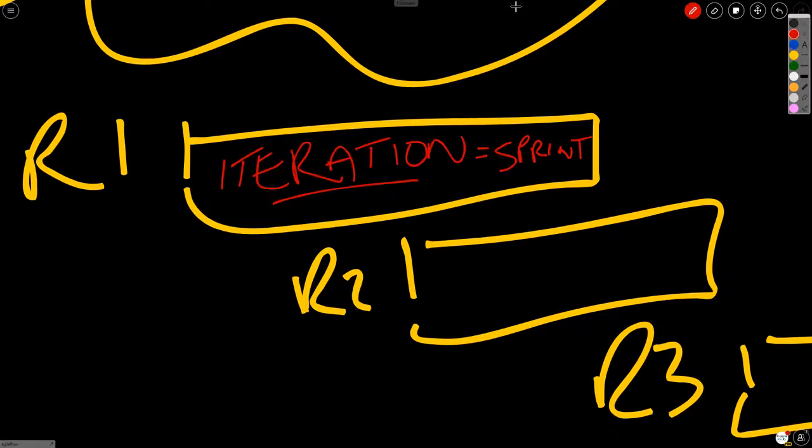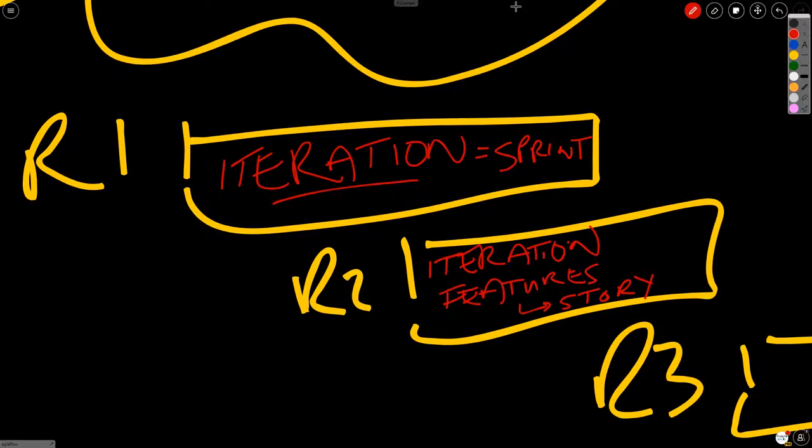So we're breaking down the iteration into the concept of feature sets. Which features are we going to be working on? And features, think about them as clusters of user stories, clusters of things that the customer wants that are released together. So under the features level, remember, we're going to get down to the story level. And stories are not necessarily needed to do Scrum or anything in Agile, but they're used quite commonly. You could refer to the user stories as customer centered requests. Some people call them requirements, quite incorrectly, because not everything is required in the world of Agile.